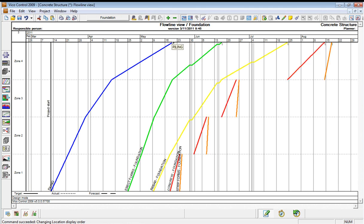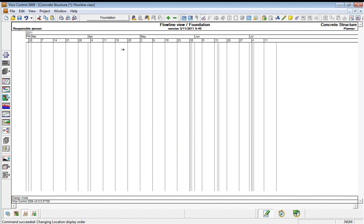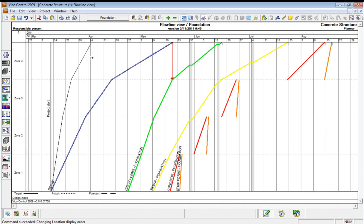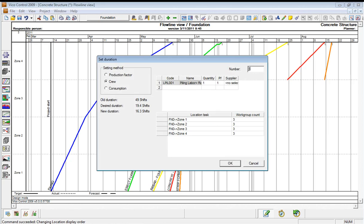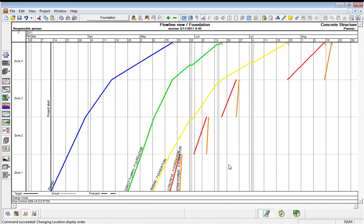We know that we can get two piling rigs on the site. So we drag the line. And when we drop it, it says you need three piling rigs to be able to achieve that. I know that I can only get two, so I say OK.